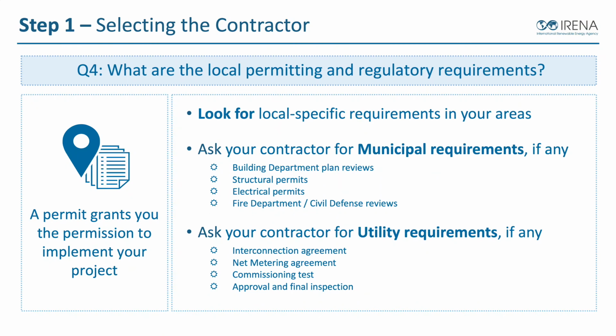Another question you're going to have to find out is, what are the local permitting and regulatory requirements? What's it take to do solar in your area? Not only from a contractor standpoint, but from a project standpoint. What permissions are needed to get a permit and do this sort of work that's going to be local. So we want to look for these local specific requirements so we know what they are, because that's also going to affect timeline and system cost and things like that.